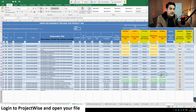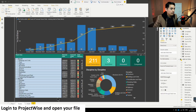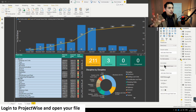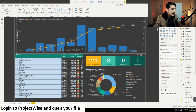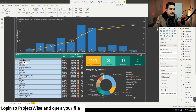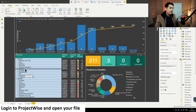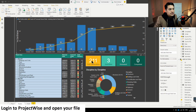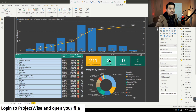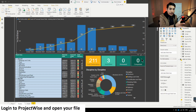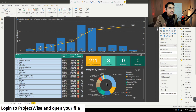I want to see how this Excel spreadsheet changes as I make updates in P6, and I want those changes reflected in my Power BI report. I've already produced a report — it's basically an S-curve accumulating all the documents by month that I need to produce, grouped and sorted by work area and discipline. I follow a funnel process showing the total deliverables, how many have been submitted, how many are under review, and how many are completed. I can also filter by discipline or by work area.